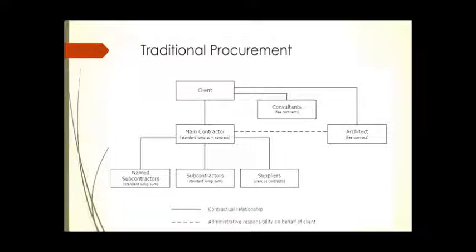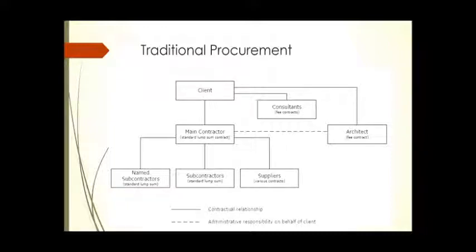The relationship between the architect and the main contractor is the problematic area. This is the direction line: under any traditional procurement route, who is going to issue an instruction to the contractor? After the signing of the contract and the kick-off meeting, when you want to send instruction number one for changes, it should be the architect — not the client — because the architect is the party responsible for issuing instructions.